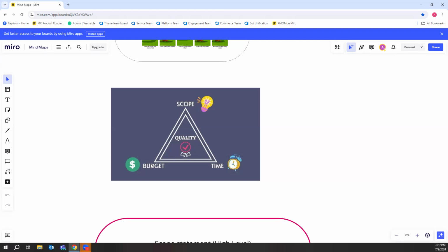Right. So they wanted the full project done, but we were able to sort of play around with the budget and the time. Okay. Time is a little bit trickier in that sense, because the idea was by 2010 World Cup, it had to be done. But if you consider that the initial plan was actually to have it done in 2009, they wanted about a year or so, and I can't remember the exact details, to run it and make sure that there were no issues by the time World Cup happened. But if you remember correctly, I think they opened it like a month or two before the World Cup. So things didn't go according to plan.